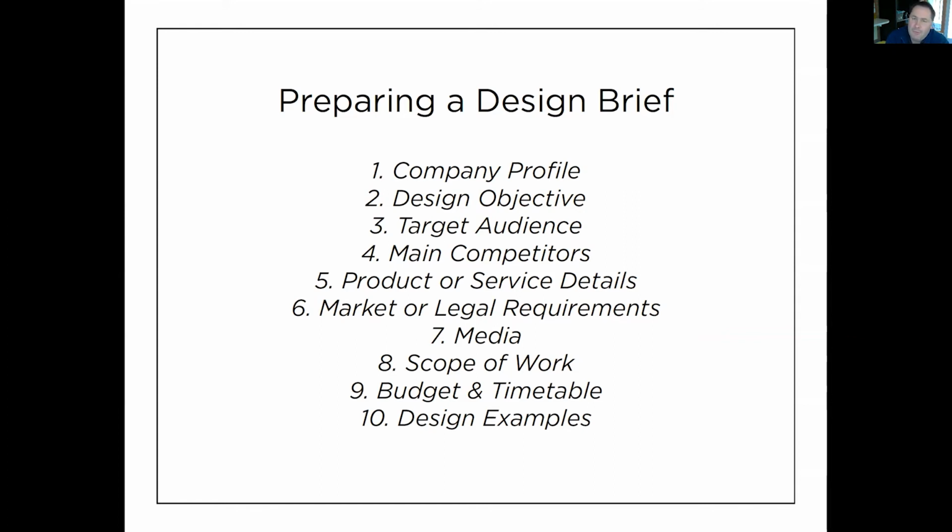This is where you don't quote the job properly. If you do a brochure and it takes you on average about 2 hours to design it, well, factor in that you have to present it to the client. The client's going to have changes. Those changes will come back. Then you have to get it back to the client for them to approve it. And then they say, well, let's change this.